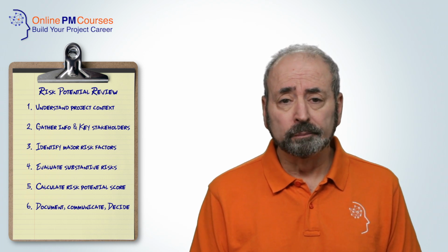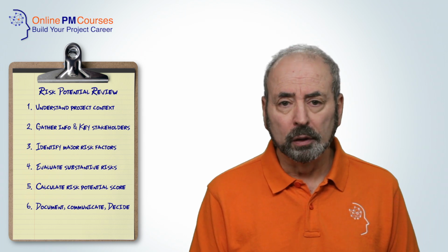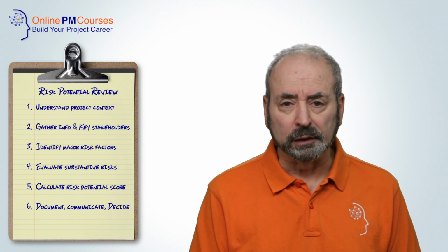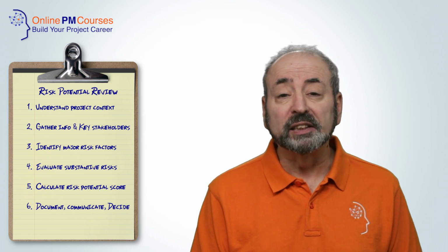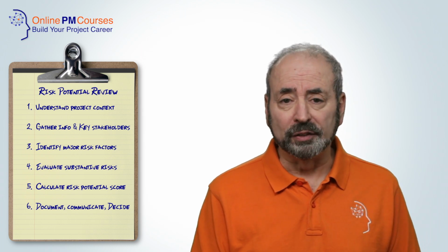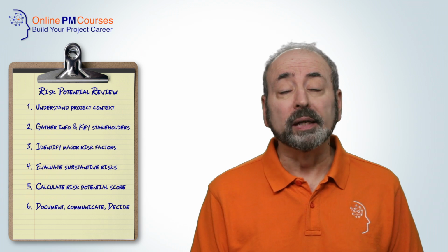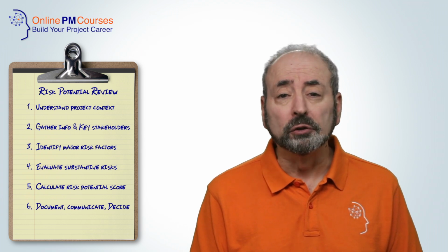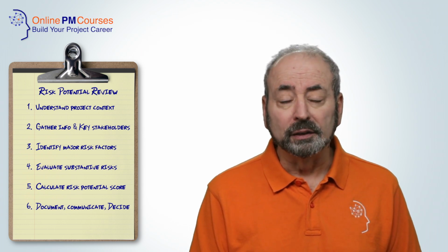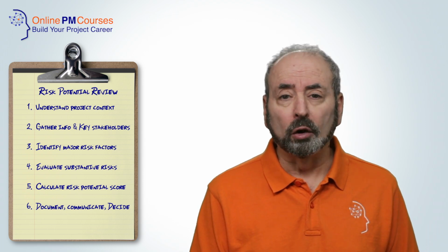This typically includes the project's context and purpose, key high-risk areas, the main drivers of uncertainty, recommended mitigation actions, the implication of the risks on schedule, scope, quality, and budget, the overall risk potential rating, and the rationale for this. A recommendation on whether the project is suitable to proceed, considering the organisation's risk tolerance and risk capacity.